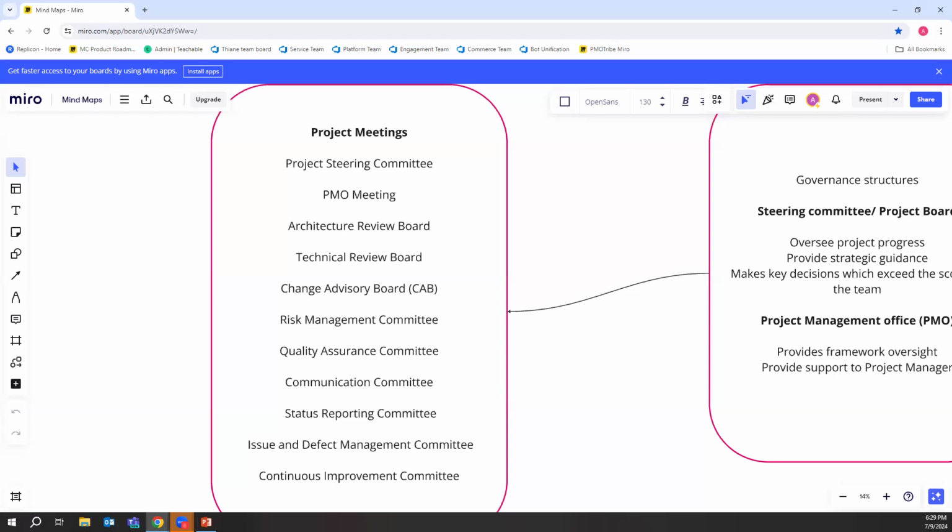Where your stakeholders are high level and that's what they want to see, that's perfectly fine. If you're a consultant, for those of you who want to go into that space, generally on the work that we deliver, we're not expected to have steercos with our stakeholders or our sponsors. I recommend that you do, and literally give a 2-slide update. What are my risks? What are my issues? Or what is my progress based on what was asked, and just if there's any changes that they want. It's literally that simple. All right.